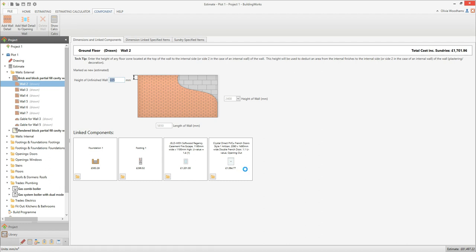If you want, you can swap the resources being used to see how it impacts on your budget. Let's have a go at swapping the brick type. Note that when you change the brick type in one wall, the brick type will be changed in every other wall within the estimating calculator.